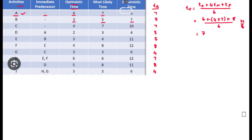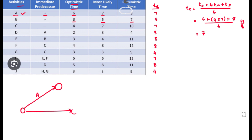Now we can draw the network diagram. For activities A, B, and C there is no predecessor activity, so we draw them from the start node. This one is A, this one is B, and this one is C.